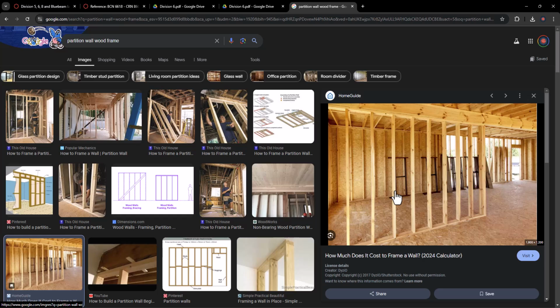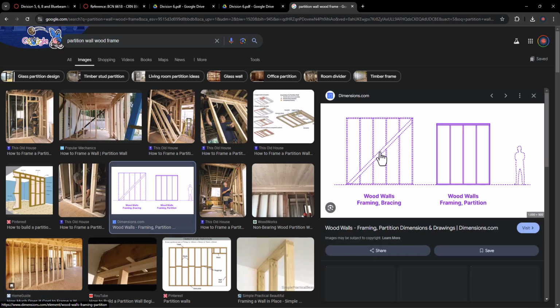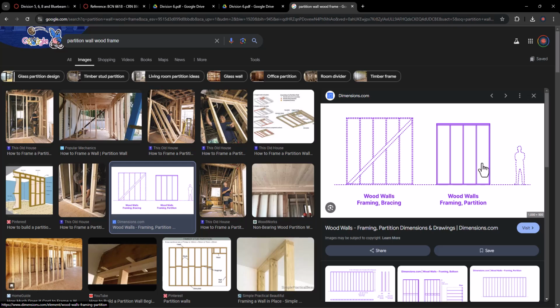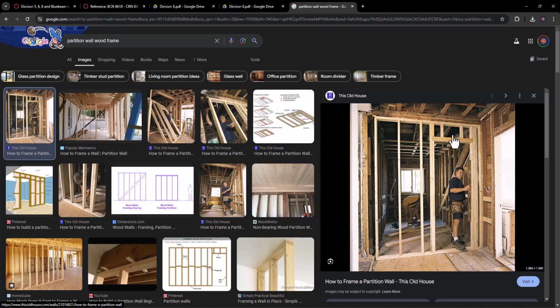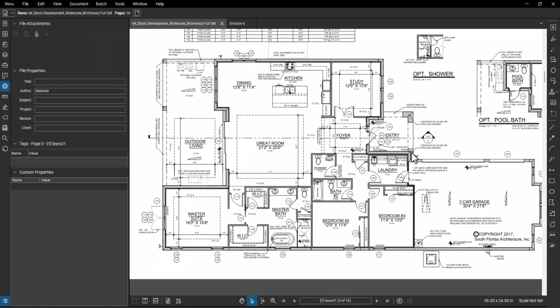For the wood frame, they have a lot of components, but it's mainly studs over here, and sometimes they have some bracing, sometimes they don't. The idea is that the component over here has a lot of pieces, including the door as well. If we count each individual piece and measure by board foot, we can do that. That will be very accurate. However, it will slow us down a lot, especially for this one which is just a small project.